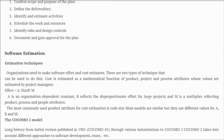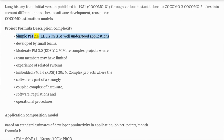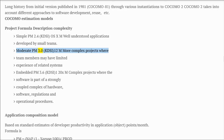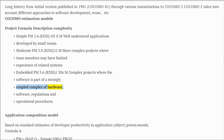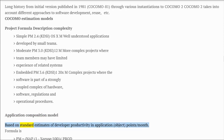COCOMO estimation models — project formula descriptions: Simple: PM = 2.4 × KDSI^1.05 × M — well understood applications developed by small teams. Moderate: PM = 3.0 × KDSI^1.12 × M — more complex projects where team members may have limited experience of related systems. Embedded: PM = 3.6 × KDSI^1.20 × M — complex projects where the software is part of a strongly coupled complex of hardware, software, regulations, and operational procedures.